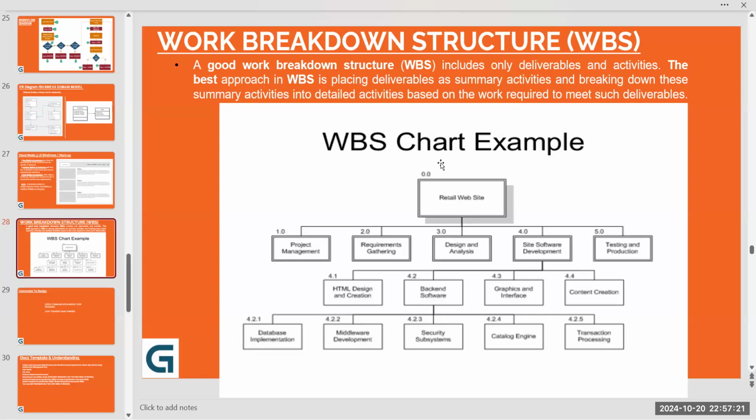In many organizations, when I was earlier part of some of the Indian tech giants, they had this WBS concept. Along with our attendance, we also had to mention our WBS for a particular project to identify, okay, we are working on this kind of task, or we are part of this team. So that's why the WBS has multiple uses. First of all, to understand the total cost, and second, to give the details of the work to the customer. They also know what WBS we're using, or at least we share with them. And last but not the least, as an employee, we also know which team we belong to and what we are working on. So the WBS is unique for a particular team. So now you understood why the work breakdown structure is important and why it is used in organizations.